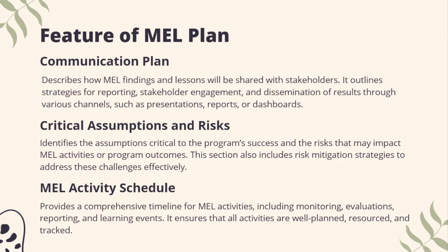Another feature that you may want to include is the MEL activity. With the MEL activity, you need to provide a comprehensive timeline, like a Gantt chart, of all the MEL activities that you're going to do in that particular project. You need to ensure that they are well planned, they have resources, and they can be tracked. And then another bonus feature that you can add in the MEL plan is the budget. You need to document how much is going to be needed for every MEL activity that you intend to do